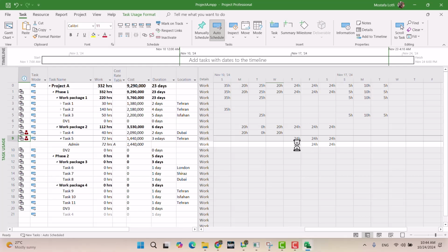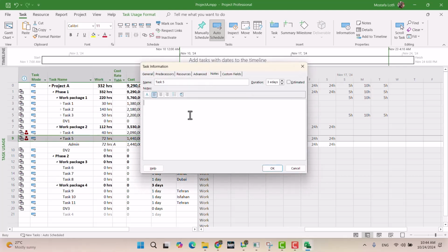But I'm really reluctant to use this approach, because later on when you want to update the project, you always have to keep in your mind, maybe put a note, that the 6 hours lag on this task is not related to link logic for previous tasks.